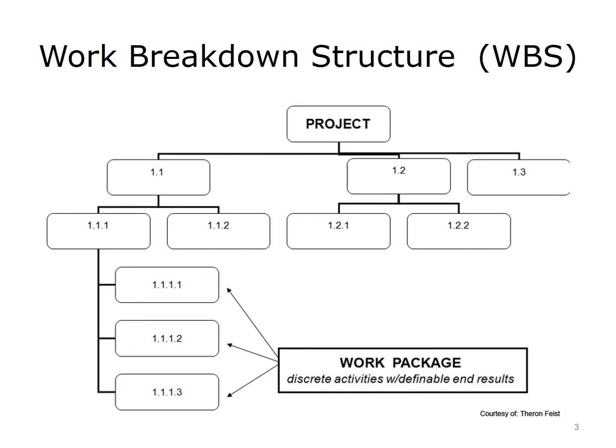The Work Breakdown Structure, or WBS, sets the project boundaries. It is created after the project scope statement is complete and provides detailed scope definition and is developed for all projects regardless of size and complexity. The WBS is one of the most important project documents created during project planning, in part because it helps prevent scope creep. The project scope statement is the starting point for building the WBS.